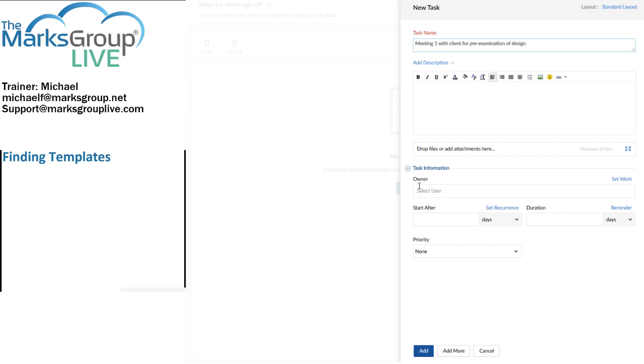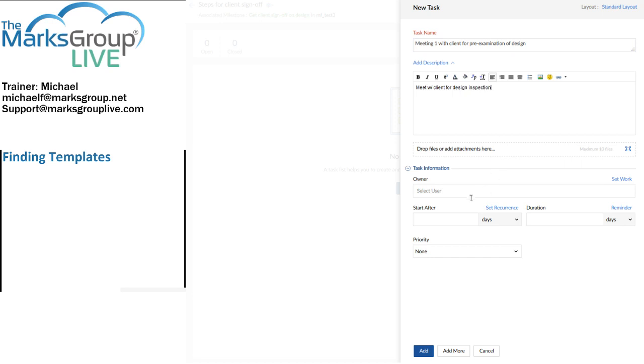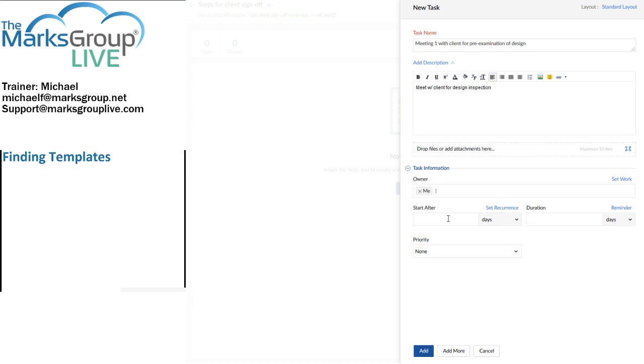meeting one with client for pre-examination of design. Now, again, I remind you here that this is a template that you will expect to use for more than one project. So you wouldn't want to put stuff in here that is specific or that you think is going to be specific to any particular project that you work in. This is stuff that you expect you're going to have to do again and again, which is why you're putting it into a template. So, meet with client for design inspection. I'll set the owner of that task to be me for the time being. I'll say we're going to start that after five days. And the duration will be one hour.